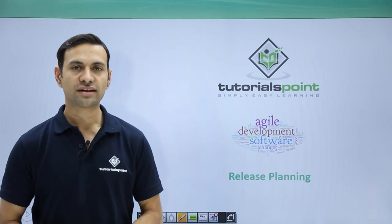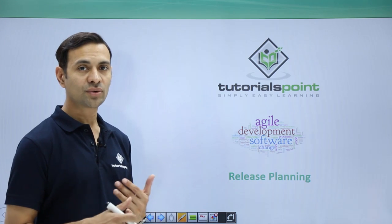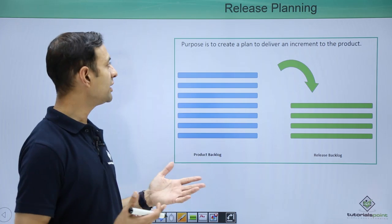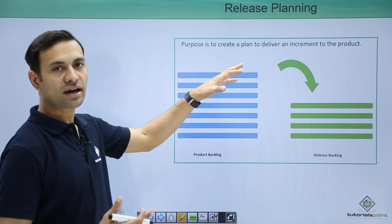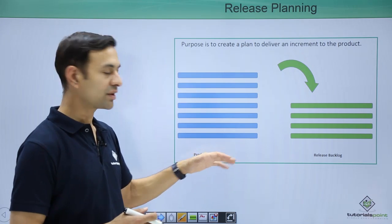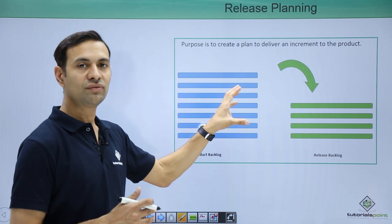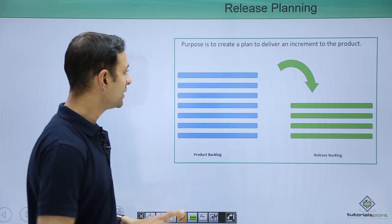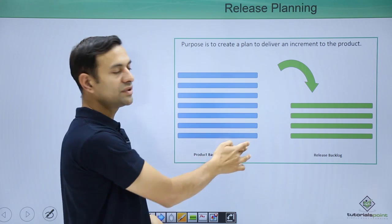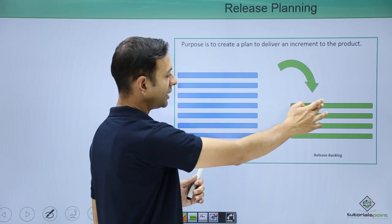Hello friends, welcome to Tutorials Point. In this session I am going to cover release planning — what to do and how to do release planning. Release planning is basically to create a plan to increment our product. We have a set of functionality in our product backlog which we are going to put in our release backlog. During this release, how many features are we going to implement? For example, I have 7 features in a particular product to be added, so I choose 4 out of 7 in my release backlog.